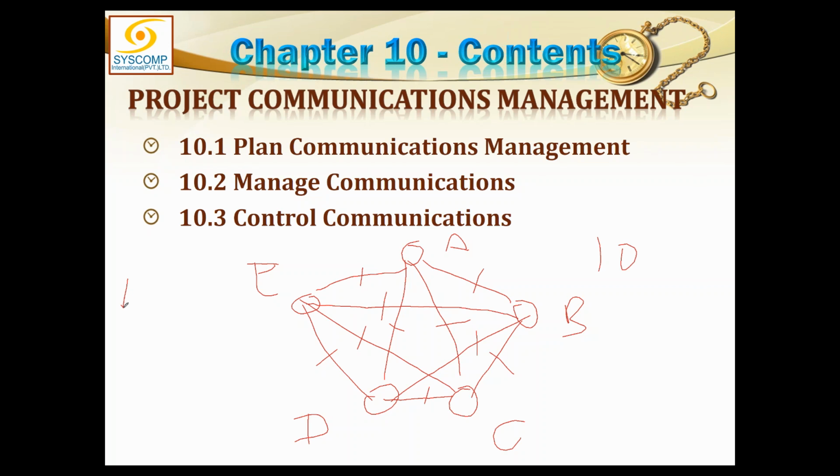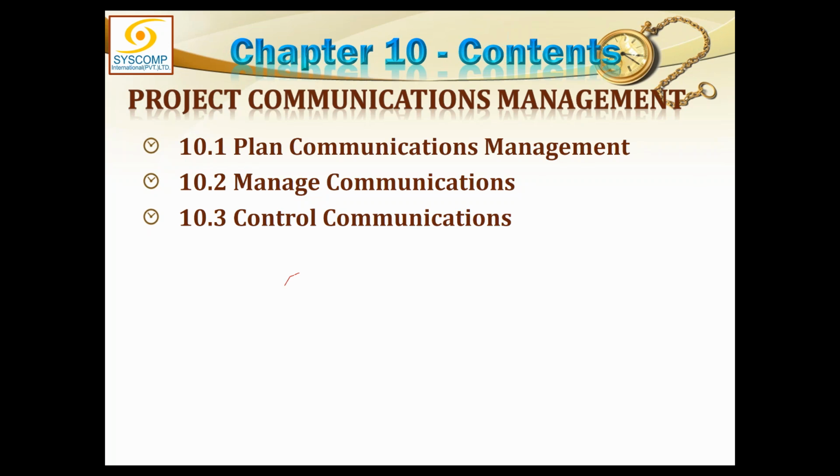You see, when we had two people, we had one channel, one person no channel, and with 4 people we had 6 channels, 3 people 3 channels, and 5 people 10. So can we come up with some kind of formula for that? The formula is n into n minus 1 divided by 2.